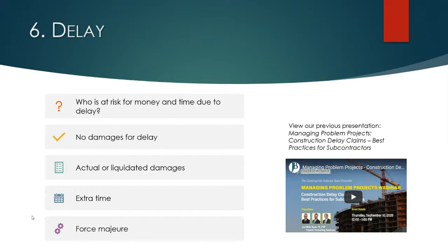because I know by talking with people in the construction industry, the term liquidated damages has a really bad rap. And I see subs have an automatic knee-jerk reaction when they see the words liquidated damages. Well, it's not necessarily a bad thing. And we can talk about that offline if you want, but there's a way to use liquidated damages as your friend, because if there is no liquidated damages provision, then you are most likely responsible for what's called actual damages. And that's who knows what those are going to be, but it could be a lot more than the liquidated damages amount.